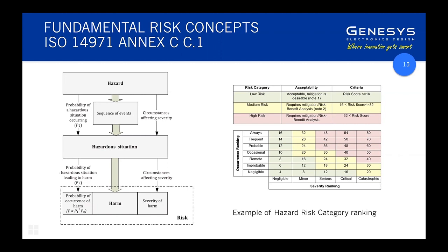And I guess it's important that you own your tables. Normally you have to, as a part of the standard, define the risk threshold acceptability criteria in your risk management plan at the start of the project. So that's important to discuss and kind of get aligned on what's a high risk and what's not a high risk, and the threshold above which you'll start doing stuff.